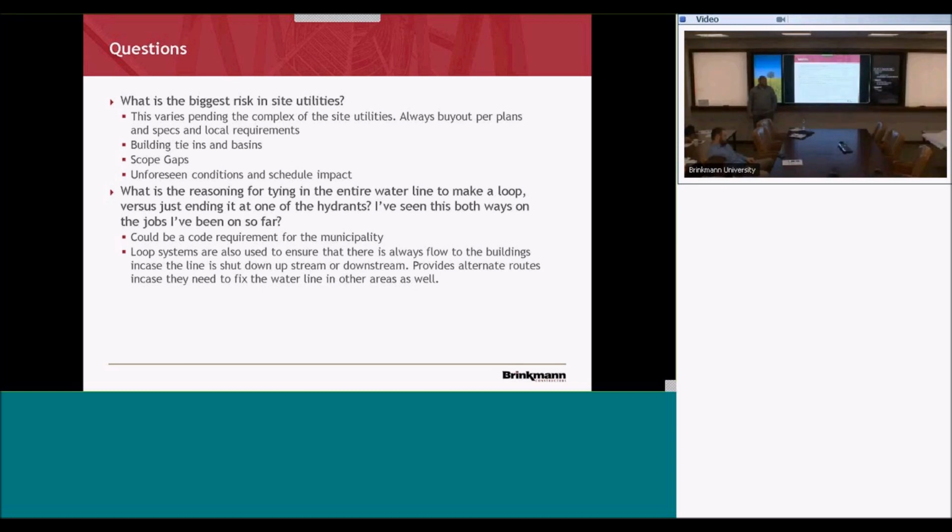It's not wrong, it's exactly where it was shown. The problem is it's very dangerous to work in close proximity. There's no workaround, there's no shield you can put up to finish your roof trusses if that happens to you. And if it happens in the middle of November coming into the holidays, most of Ameren's staff is senior and they carry 6 weeks vacation a year, and they use most of it during December. So there's a hazard itself. Still planning.